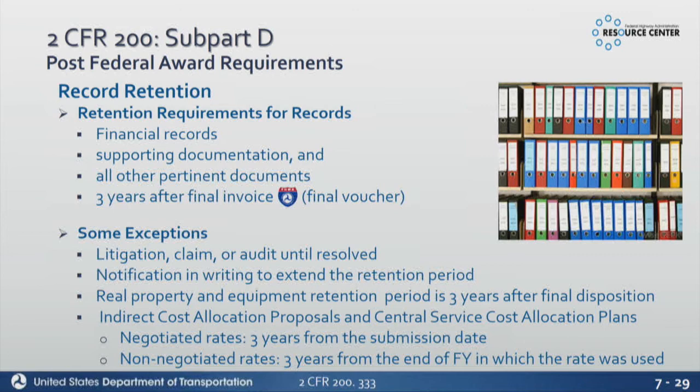Okay, record retention. Basically 3 years after final voucher. So remember, I said it earlier, this is based on the date that we signed the project in FEMAS. So when we've signed that final project in FEMAS, that's what starts your 3-year period.